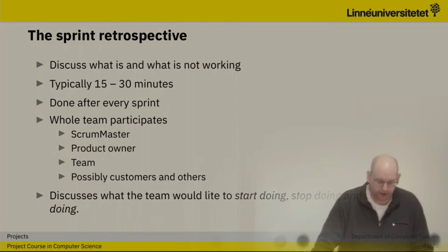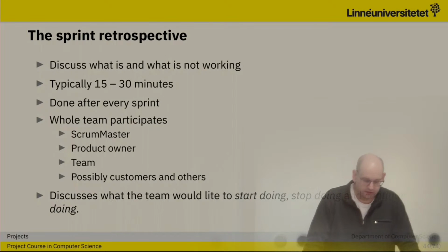After that, we have a sprint retrospective where we discuss what is and what is not working. And this is done after each sprint. The whole team participates, possibly with customers and others. And the idea here is to discuss what the team would like to start doing, stop doing, and continue doing.